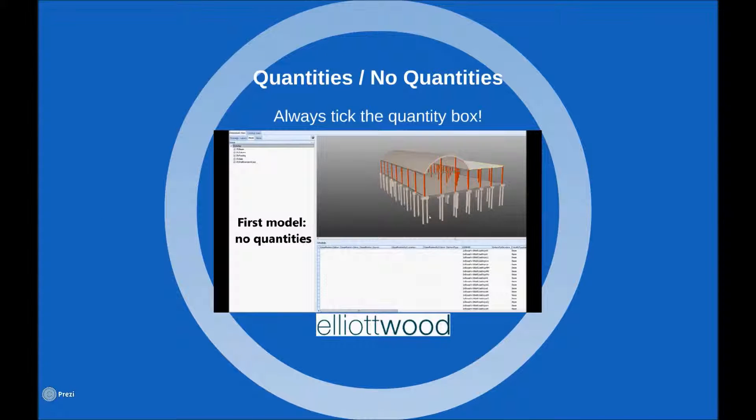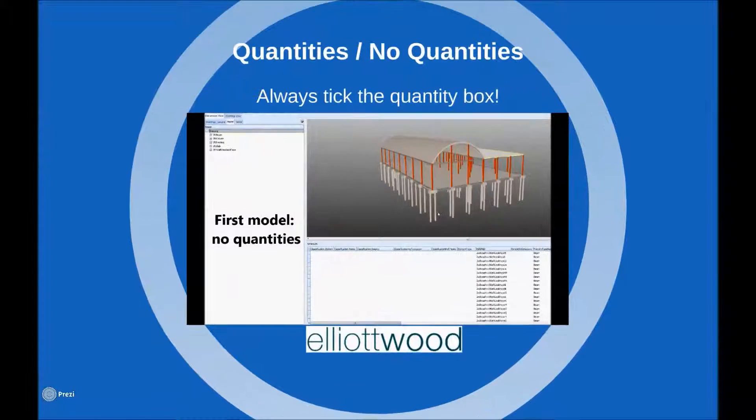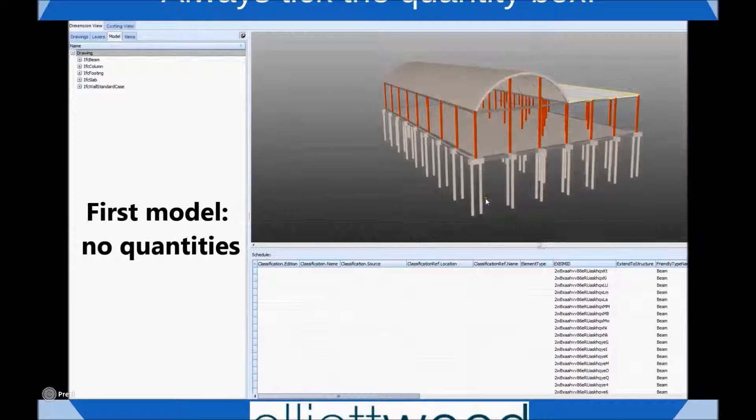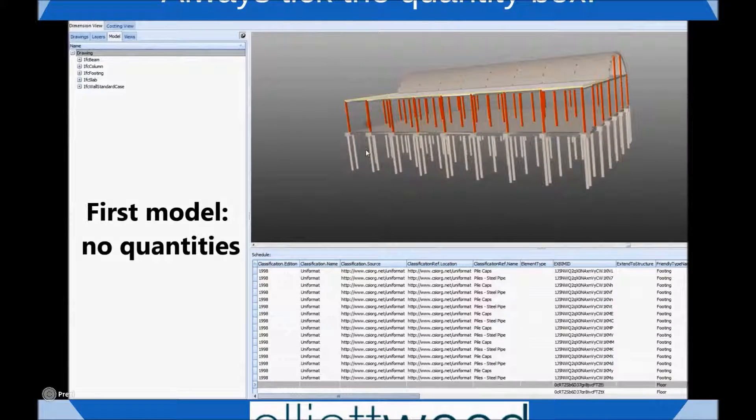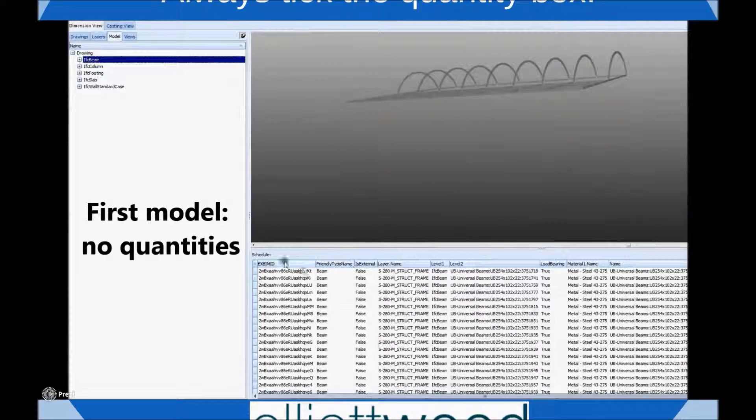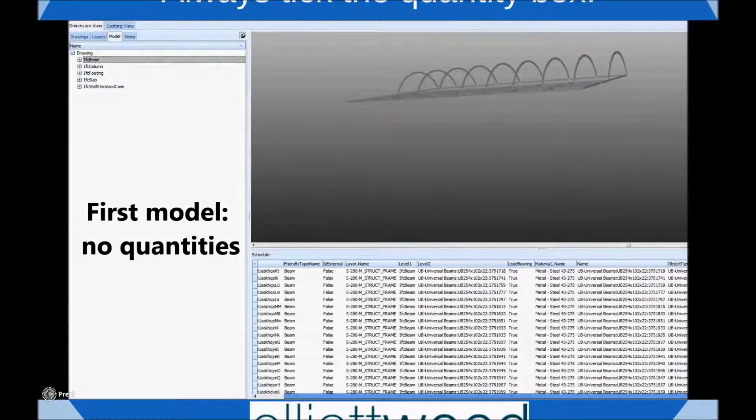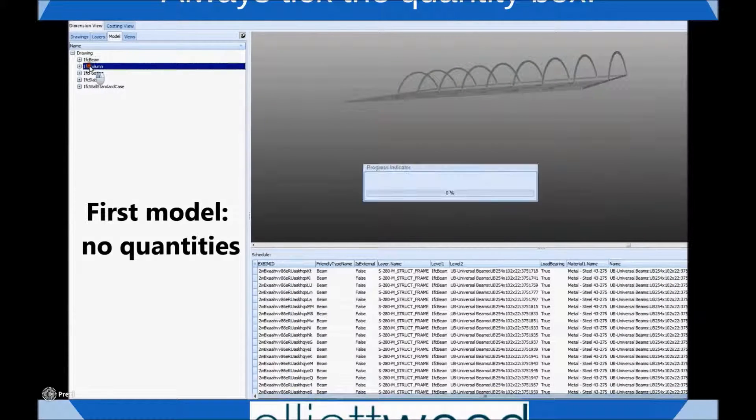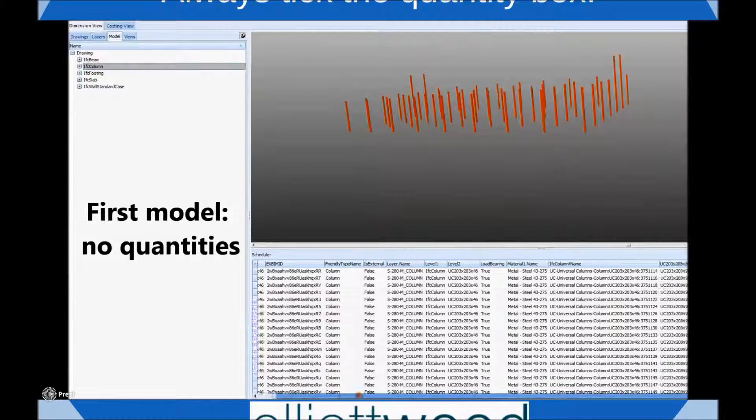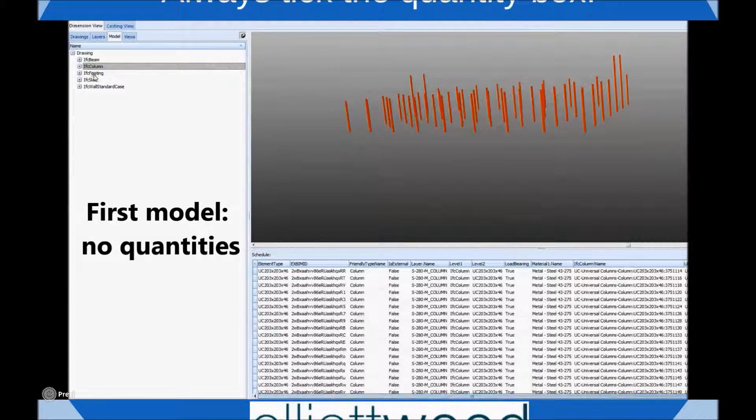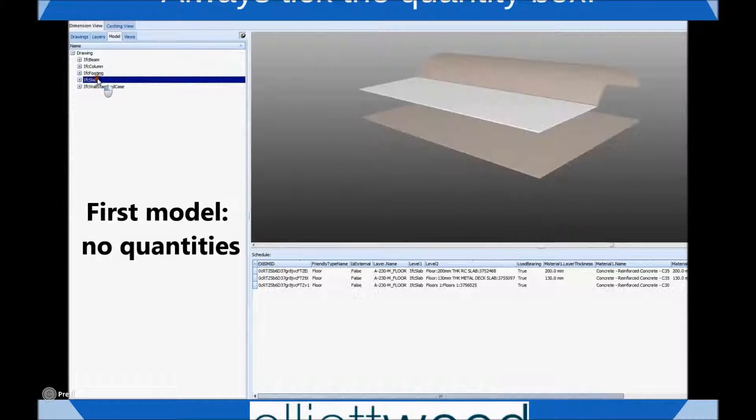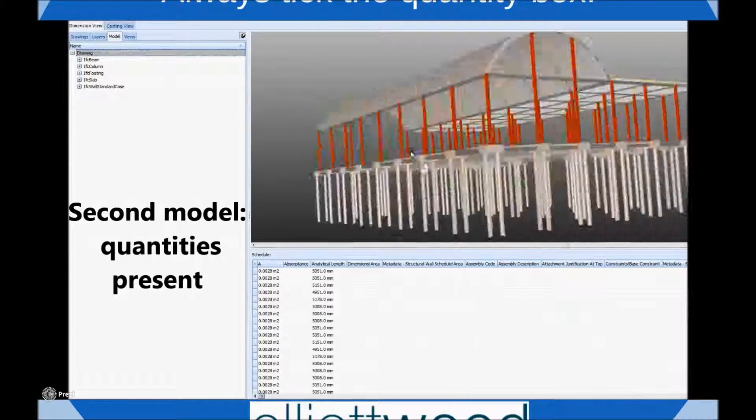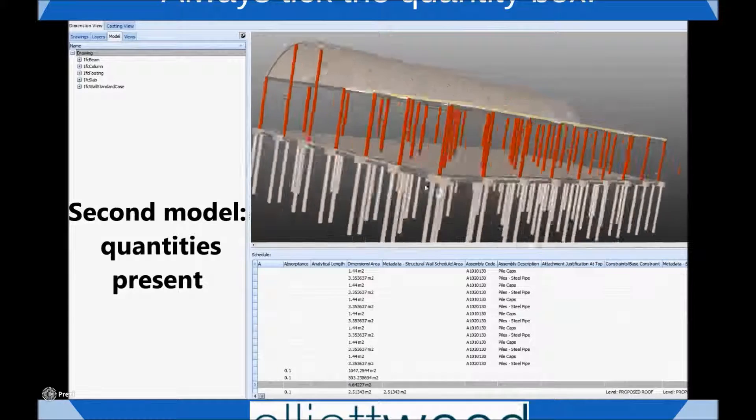This brief clip highlights one of the most very basic information requirements that is still often missed. When models are exported to IFC the option to export base quantities should always be ticked. This simple step turns an excellent 3D model into an excellent 3D model with great data.